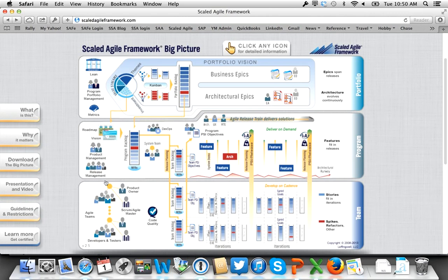That's a tyranny of the urgent. So I sat on a podium the other day where a company had, and I thought this was pretty aggressive, they actually did two 2-week sprints and a 2-week hardening and innovation sprint. So they would sprint twice, clean off their desks, and what they said was our teams love that because sprinting is really hard work, and you can't really take much risk in a sprint, no matter what you say, because the commitments get made to the sprint objective.